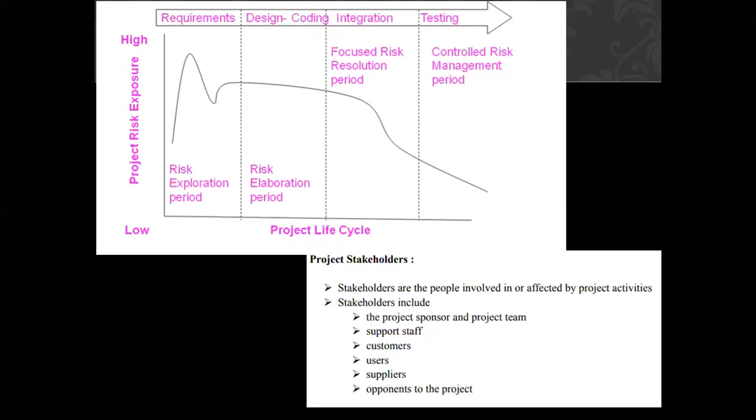When integration starts, then most of the defects start occurring, and at that point of time, we are controlling and removing those defects. So that's why this risk part is going gradually down over here. And during the testing phase, it is in a controlled manner. But when you reach this level, it can be the scenario that you have already missed the delivery date. So this late risk resolution in practice again becomes one of the scenarios which can occur.